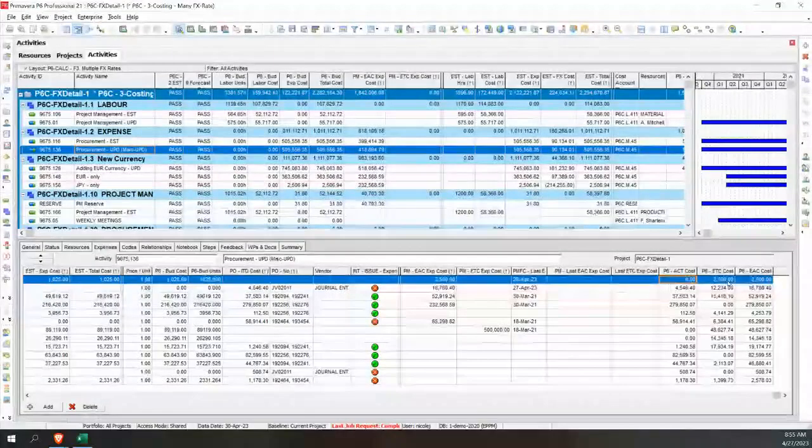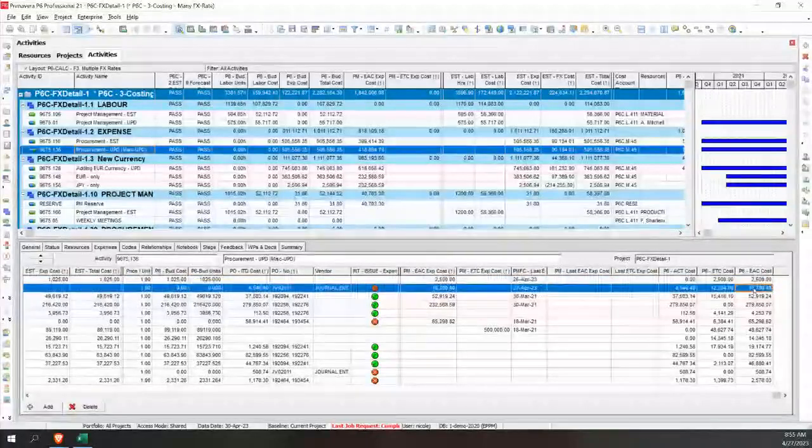Okay, so for whatever reason, we know we're going to start to go over. So it takes the values put in by the project manager and it updates appropriately the P6 field. Okay, so in this example, we also forecasted it to be 16,000. We've got an actual so far from our integration in this example, and then it will calculate the difference for the estimate to complete.